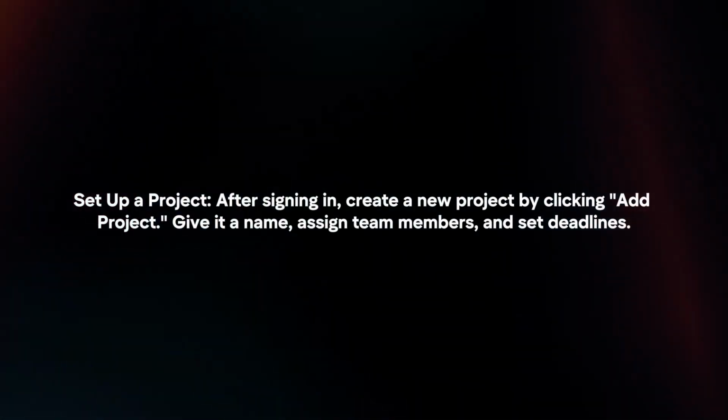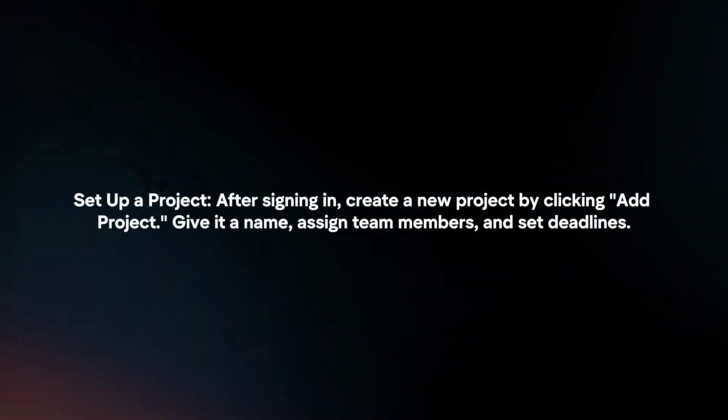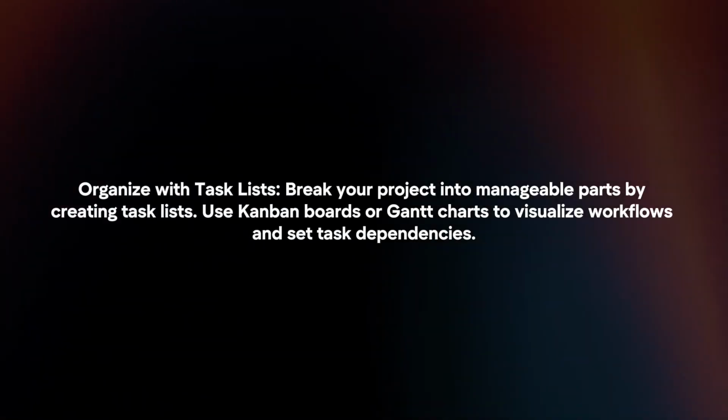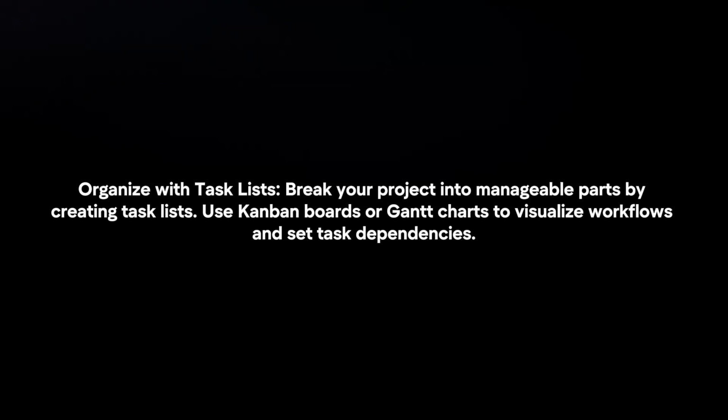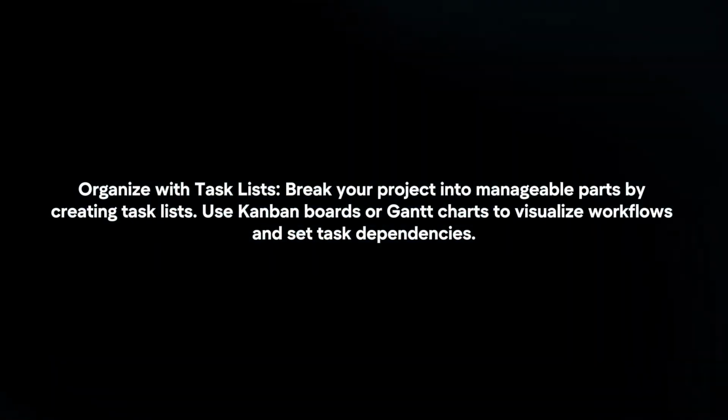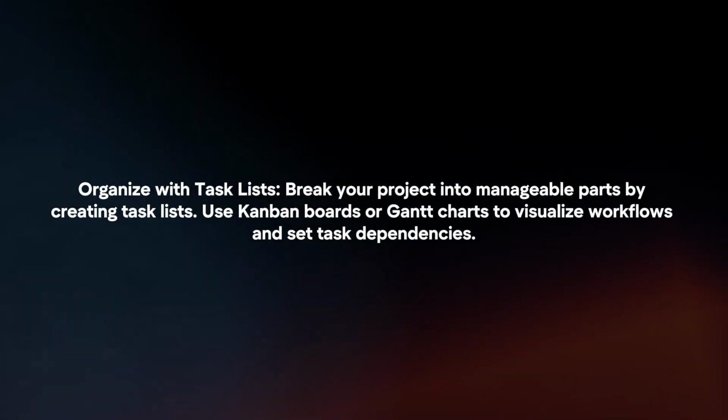Give it a name, assign team members, and set deadlines. Organize with task lists. Break your project into manageable parts by creating task lists. Use Kanban boards or Gantt charts to visualize workflows and set task dependencies.